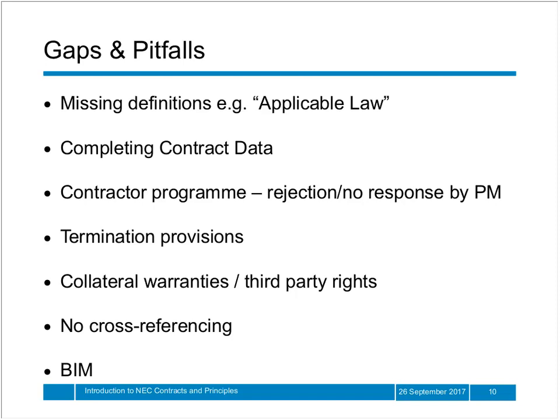Many usual and obvious definitions are missing, and it's normal to add these. So one example would be the definition of applicable law. Whilst the NEC 3 contract does note varying obligations on the parties with regard to applicable law, it doesn't define what this actually is, and therefore the extent of obligations linked to applicable law are uncertain. So adding a definition of this term fills this gap and eliminates a needless uncertainty for all parties. There are other similar examples.